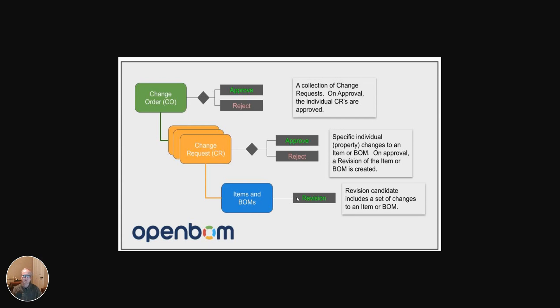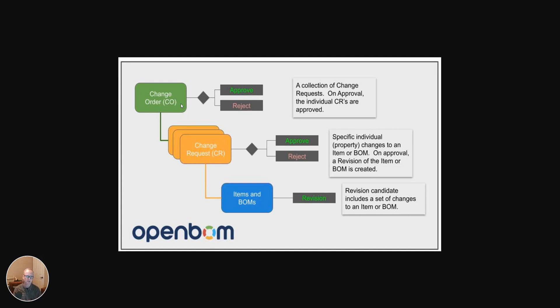The change request begins to give us that approval and visibility and control around revisions, and we'll see how that works in just a moment. And then, of course, the change order, which can be a collection of change requests and gives you more of a batch processing to approve or reject a group of changes. You may think of this like an ECO. So again, this is meant to be an introduction.